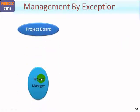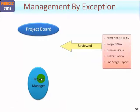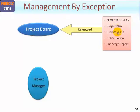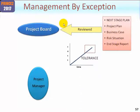So here we have the project board and here we have the project manager. We know at the end of each stage the next stage plan will be created, the project plan will be updated as will the business case and risk situation, and an end stage report created by the project manager. This is brought back to the project board who review it at an end stage assessment.